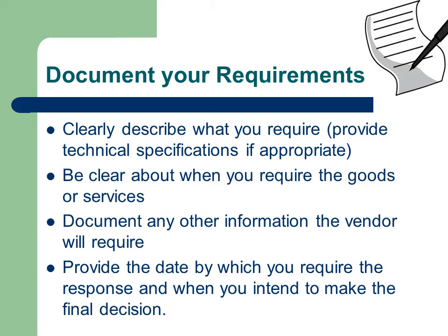Be clear about when you will require the goods or services, as this may impact the vendor's ability to deliver. Provide the vendor with any other information they may need, for example, information about the working environment or location or safety factors. Provide the date by which you require the response and also when you intend to make the final decision.